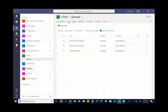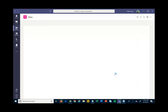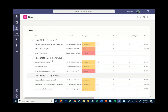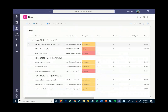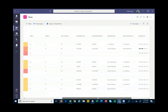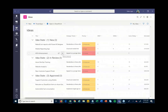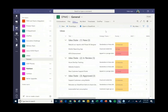We can also put an idea portal in here, allowing people to come in and submit ideas and requests for new projects. I can hit New, fill out a short form, and that idea goes into a list where we can track it in one place. When ready, we can promote those ideas into projects and start more detailed planning, rather than people sending emails or maintaining separate Excel spreadsheets to track requests.